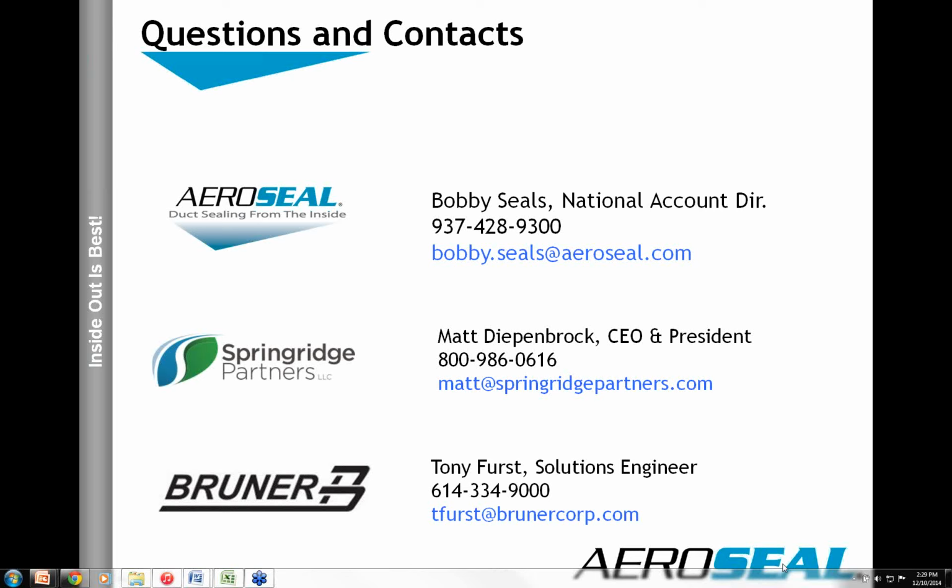Normally, in the ESCO realm, Aerosol will be sitting usually right around $2 to $3 for, for instance, an existing VAV system, because it's all labor. This is mainly labor intensive, and depending upon your labor rates in your area, it could bump up to $3 to $4. If we're playing in a $120 an hour labor rate versus a $50 an hour labor rate, that's going to vary a lot as far as the price per CFM. Also on top of that, I explained that that was a VAV system.